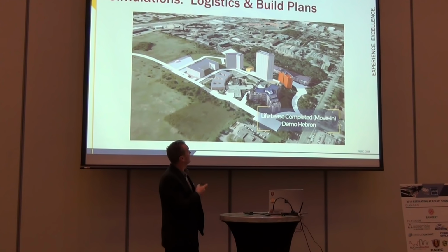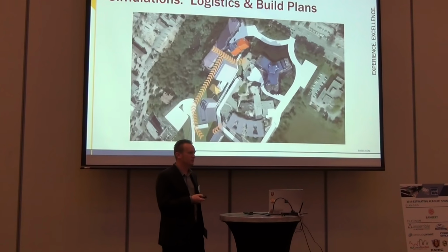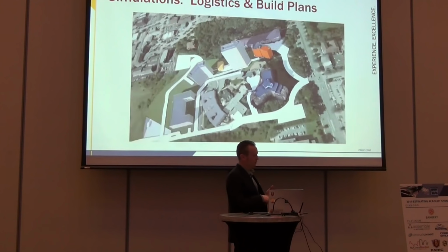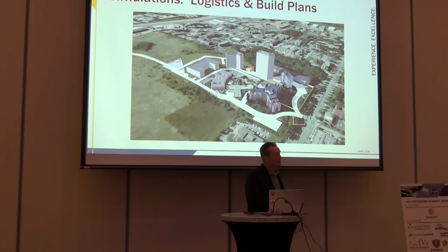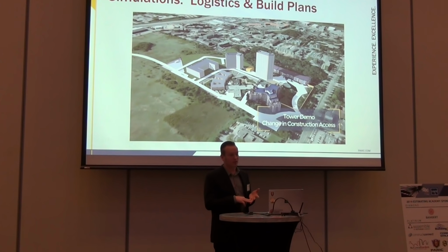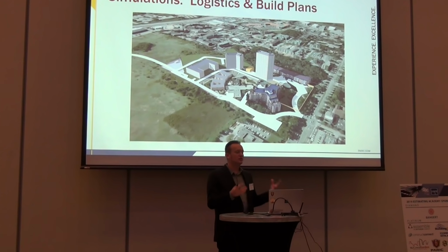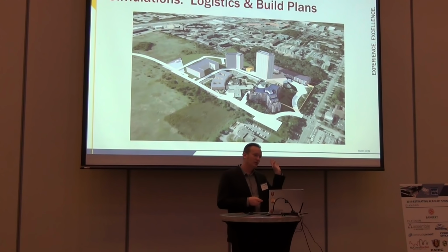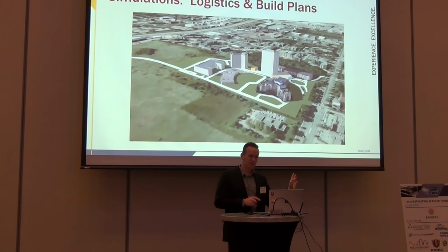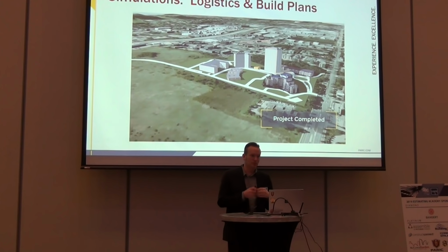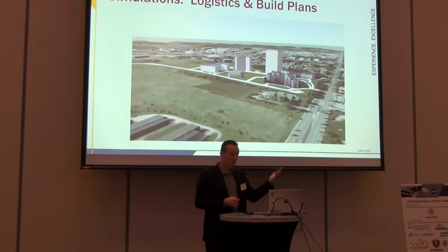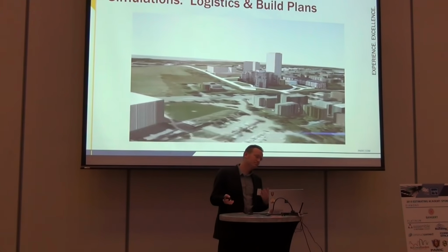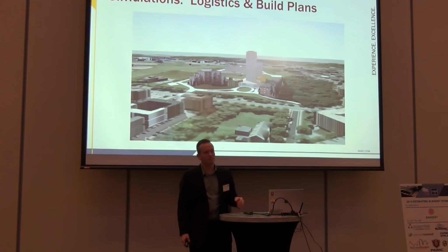But this helped us understand a lot of this information, so we could really quickly throw together an estimate around what we're going to do on winter heat, what we're going to do on tinting and those kinds of things, what we're going to do with concrete, when we could actually get concrete. We had to understand the local market and that kind of stuff. There's just a ton of stuff that goes into this. So I obviously can't give you every example, but I'm trying to paint a picture. This was just something that we did over the course of about a week or two, and the amount of information it provided was really valuable. And it's a $200 million project, right? So, will we do it on a $10 million job? Probably. We do it.